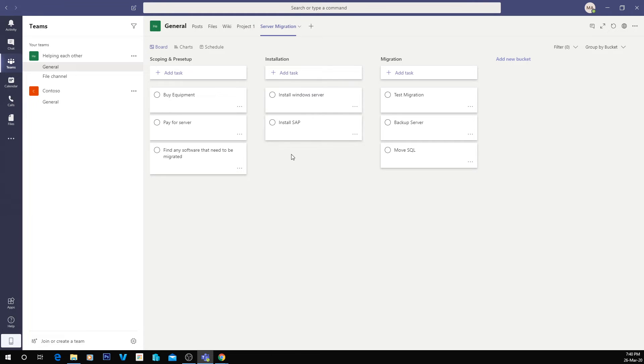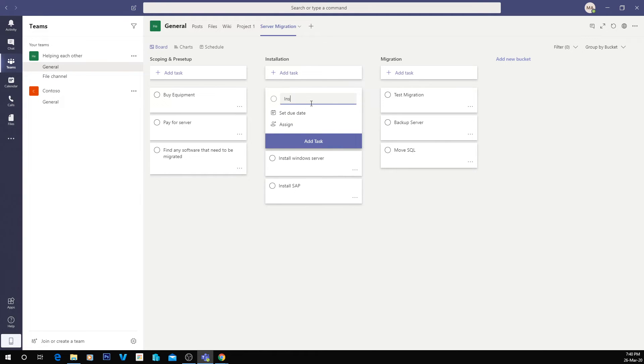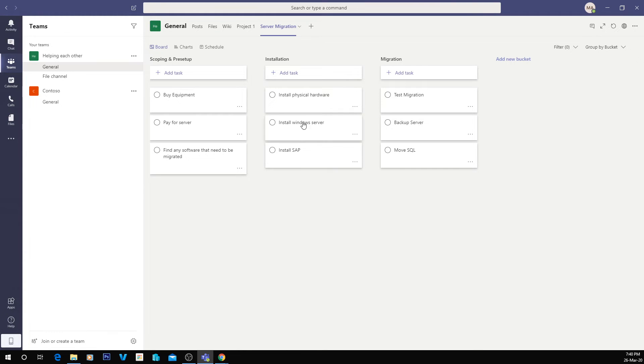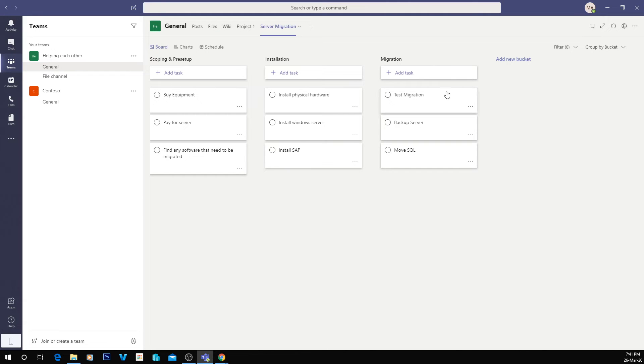Our installation, we might also install physical hardware. We'll just have that too. So what we're going to do is install the physical hardware, install Windows Server, and then install SAP.